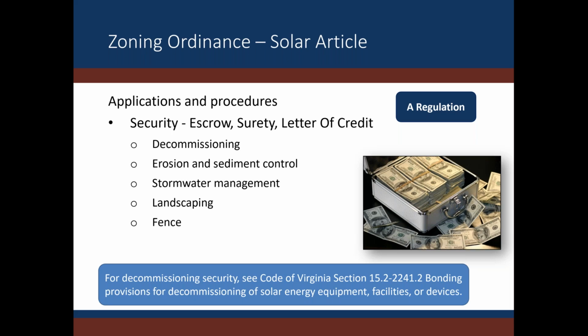And when decommissioning, there is going to be upfront cost, as well as salvage value is going to depend on the proper decommissioning of that equipment. And so you can't be certain of that, and we don't want to see anyone stuck in a bad place. So we do not recommend accepting that salvage value. Other securities would also need to be accepted for things like erosion and sediment control, site maintenance, fencing, and landscaping.